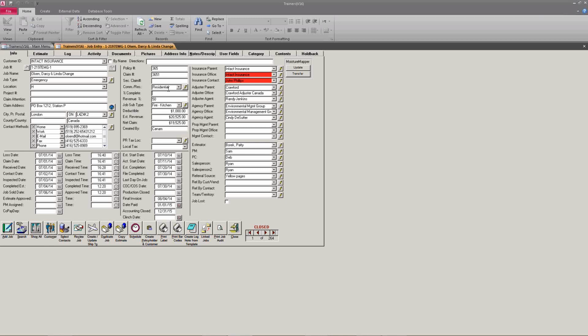I don't recommend changing this on a regular basis. You want to see what the estimate was written for, so you can use it as a report card at the end of the day when the job is finished to determine how well they did. How close to that expectation did they come?